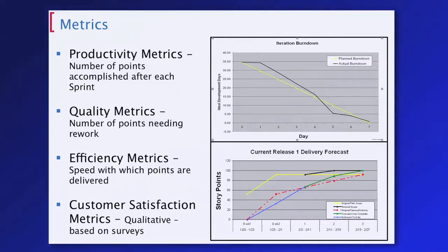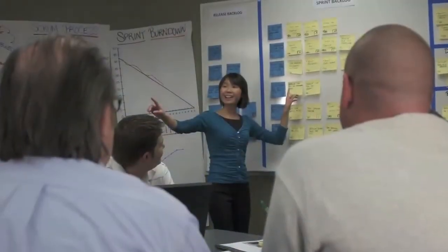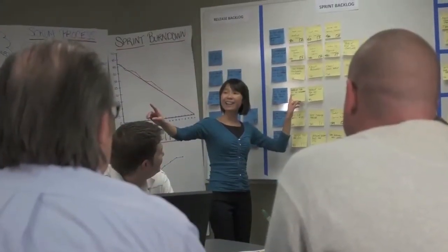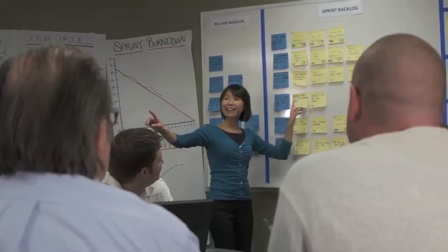So here, these guys ended up a little bit short. I think this was their first sprint, so they were a little short. But it gives you immediate information to show exactly where you are. Then we also trend this sprint by sprint. So you can now see, from a velocity perspective, how quickly your team is producing work. And are we getting better? Are we staying the same? Are we increasing?